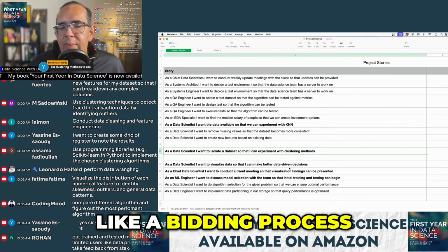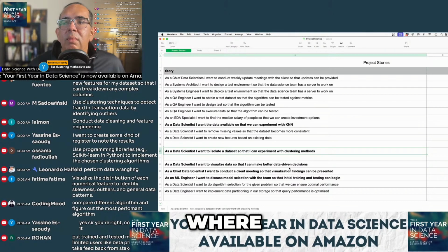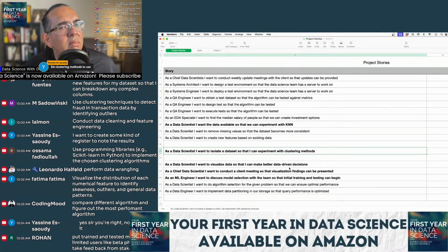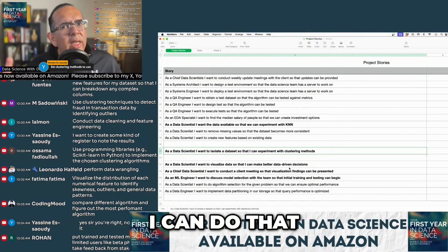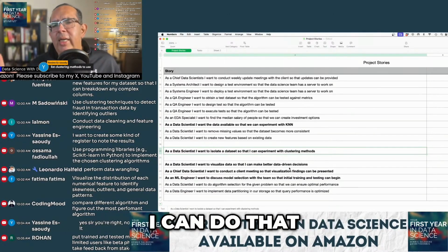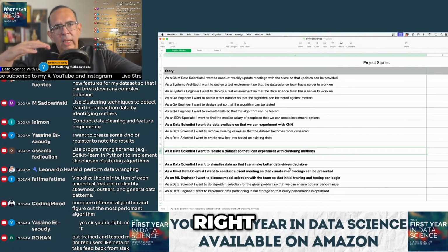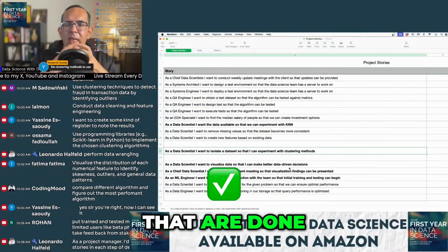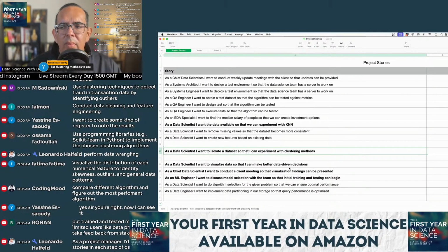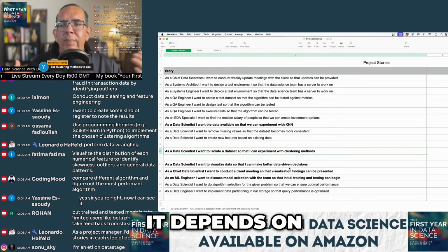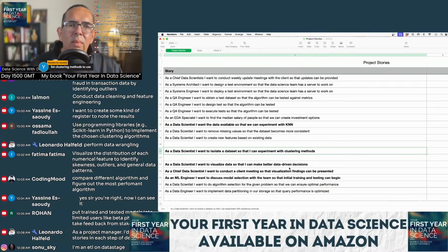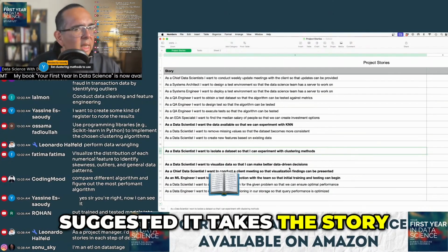In some cases, you're going to have a bidding process where one person says, yeah, I can do that, and that's the only story I can take, because it's going to take me 2 weeks. And somebody else might say, oh, no, I can do that and another story, because I think that story is only going to take me 1 week. And then another person comes along and says, no, I can do that in 3 days. I think it's a 3-day story. And so on, right? Because the more stories that are done, the more advancement in the team and in the project. So it depends on who thinks they can do it a little better. Or in some cases, whoever suggested it takes the story.